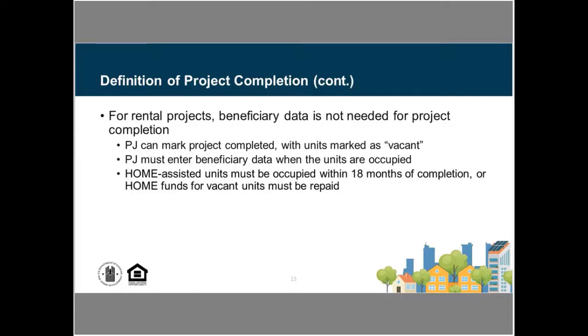So for rental projects, the requirement that construction be completed and the project meet all of our property standards does apply, and they also have to have that final disbursement of the home funds.